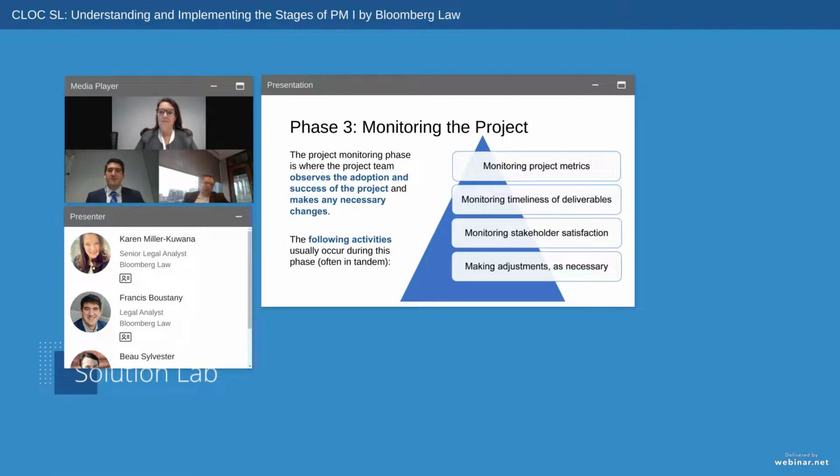Or if you're doing it from a portfolio standpoint, for each project, you've got a one-pager for each project that builds your portfolio. I love the red light approach. I'll be the first one to tell you, red, green, yellow. Green, everything's on track. We're doing great. Yellow, to me, is, hey, there's some risk, but we're not off track. We can still deliver, but I want to make sure that my leaders and my owners know that we do have some risks that we've got to identify and go get. Also allows me to do a little deeper dive and monitor those closer.